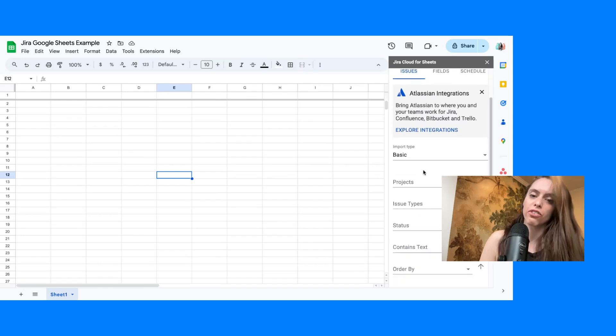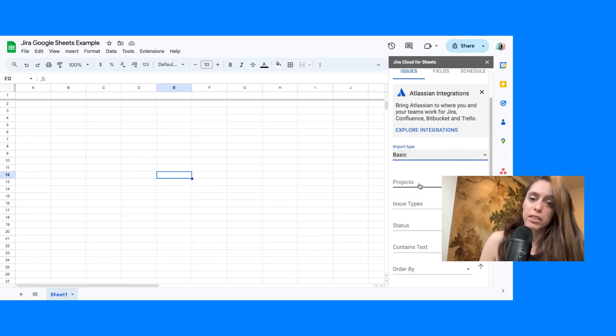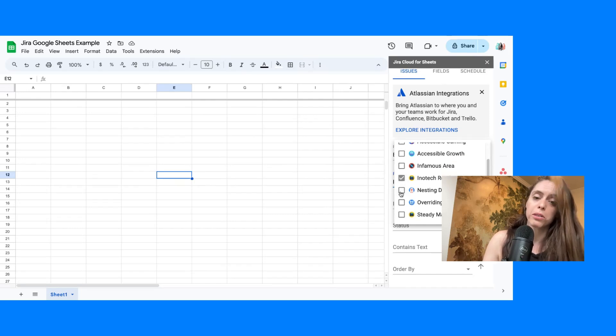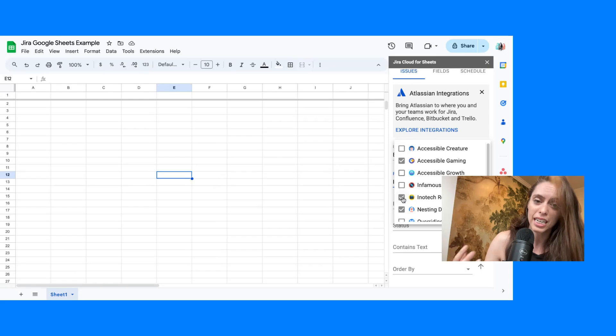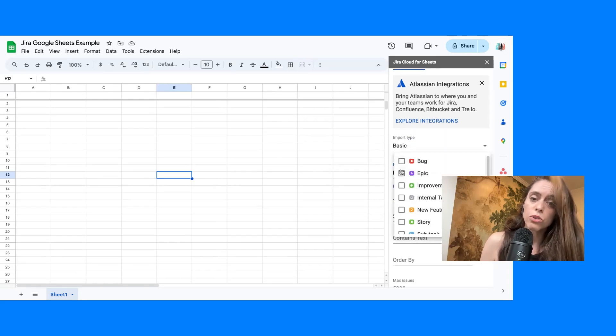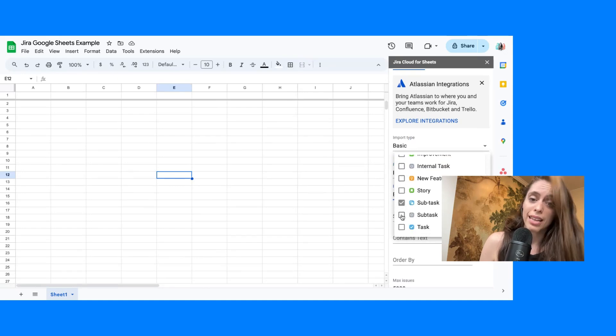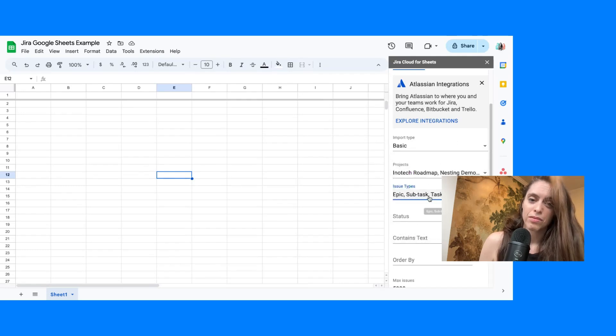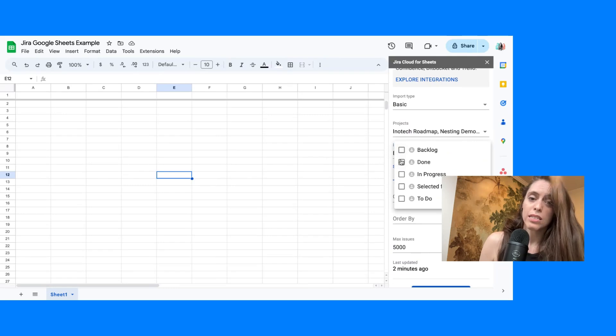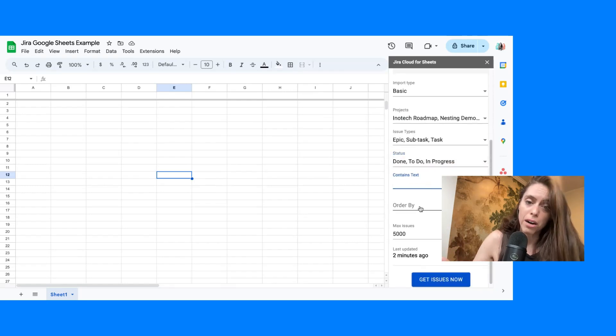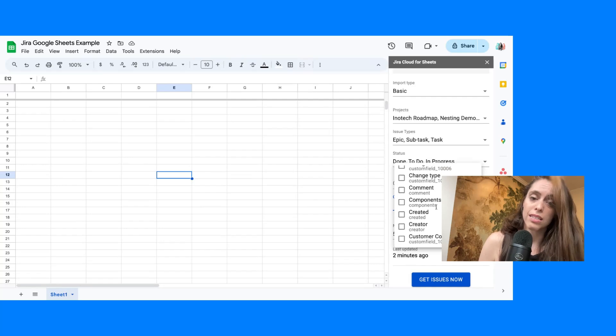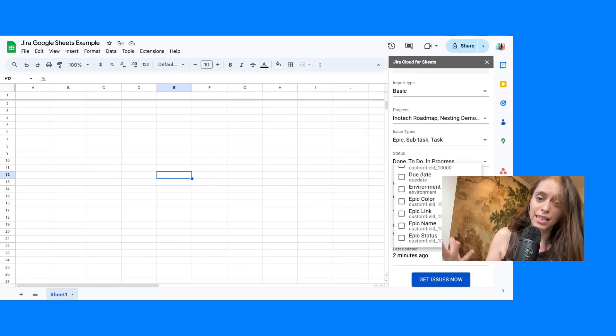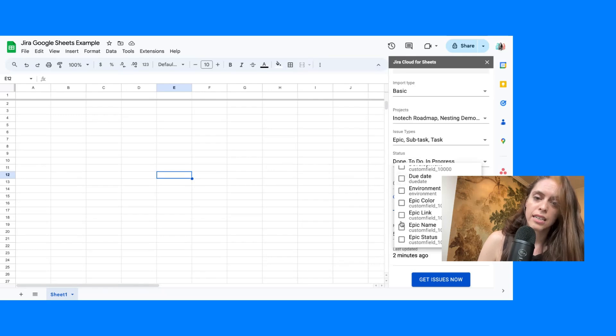From there, you'll be able to get issues from Jira. There's a basic importer and also a JQL, the ability to pull in through filters. You can choose from multiple Jira projects, so you're able to pull in issues from more than one Jira project, which is really helpful if you're dealing with large sets of data. I'm just going to choose a few myself. You can also choose what issue types you want. I'm going to go with epic, subtask, and task. They also have ones like bugs and others. You can decide what status you want to pull in. So do you want issues that are only done, that are only in progress? You can even decide the text that the issue should have. You can select how you would like the issues ordered.